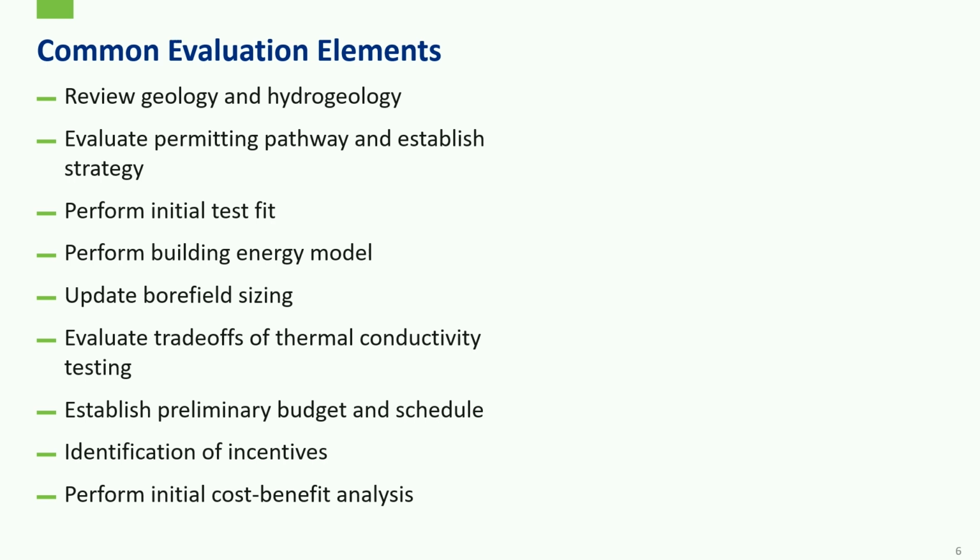You have a really good idea of how many boreholes you're going to be putting in, and you can start to say, based on the number of bores and what we think production is going to be, what the schedule is going to be. This is a good time to start engaging with the driller market if you haven't already. Certainly you have if you've drilled a test well, but if you haven't, it's a good opportunity to say, hey, I've got a project this big. We think groundwater's around here. This is approximately the geology that we're going to be in. Here's where we are geographically, and you can start to get some thumbs up quotes.